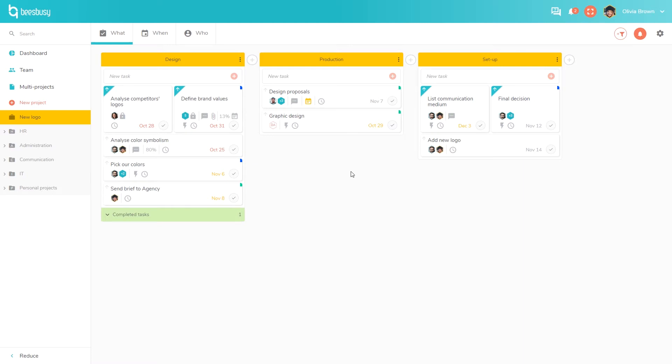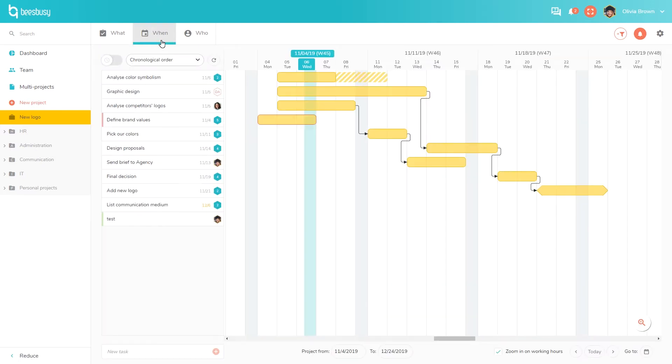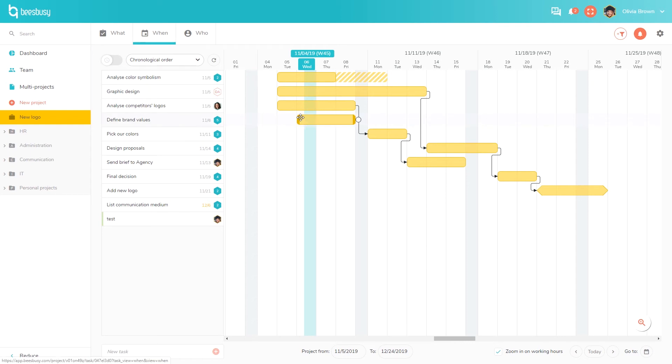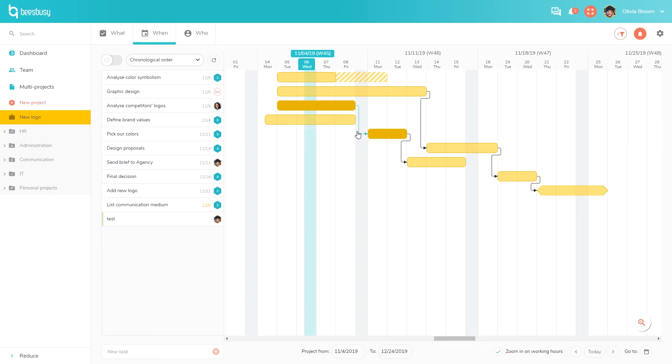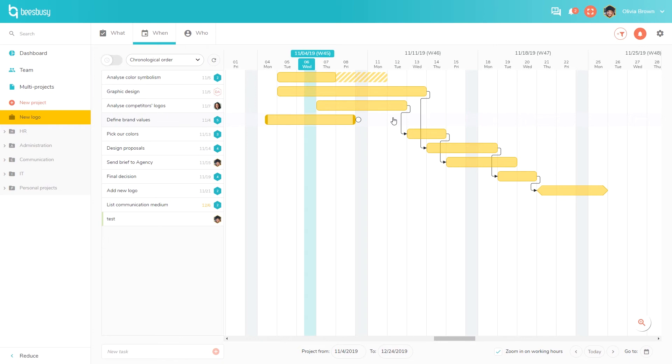So this is our What view, which is like a Kanban board. Now we will display all these tasks in a timeline in the When tab. Here you will find a Gantt chart. You can move a task to reschedule it and also change its duration. You can create links between tasks, and if you move a task linked to another one, they will both move accordingly.